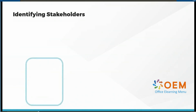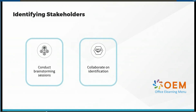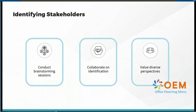To begin with, let us explore the first process for identifying stakeholders: brainstorming sessions. This involves gathering your project team and other key individuals to list all potential stakeholders. This collaborative approach ensures that no important stakeholder is overlooked. For example, in a construction project, stakeholders might include architects, engineers, local government officials, and community members. By involving diverse perspectives, you can create a comprehensive list of stakeholders.